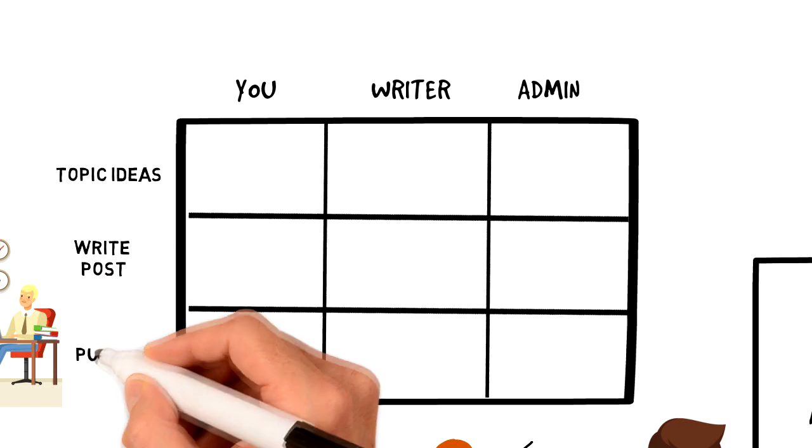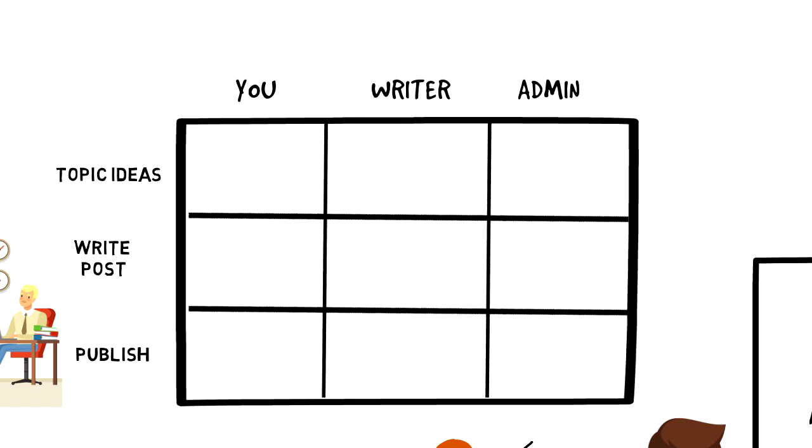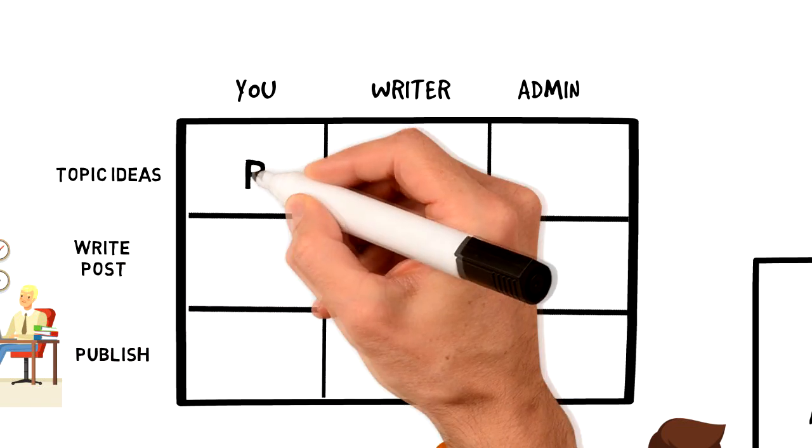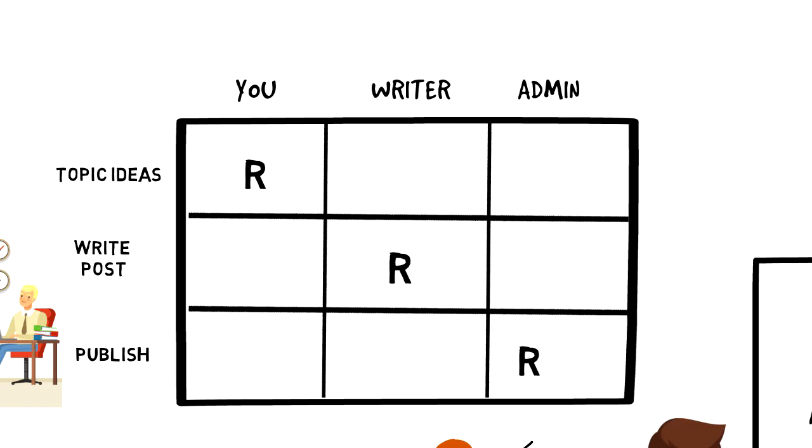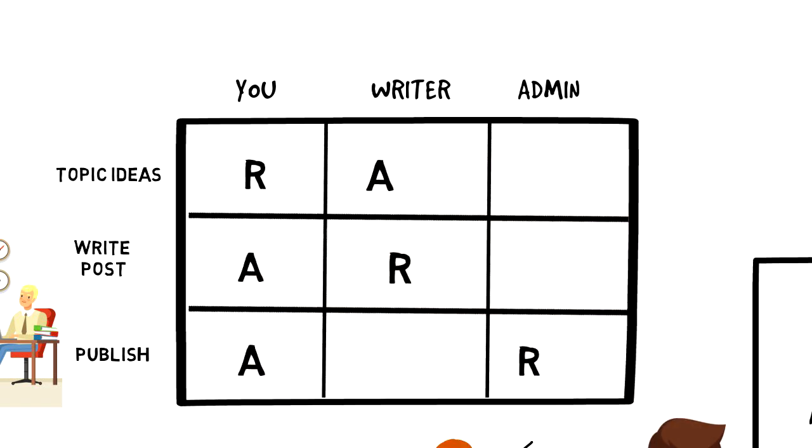Then we can go ahead and assign who will be responsible for what. Every task needs a responsible person and it is also good if there is an accountable person for each task.